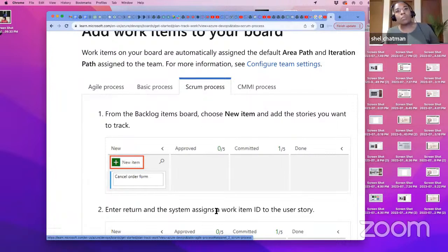So Scrum, the most popular Scrum process is 2 weeks. So every 2 weeks, you should be rolling out something new or completing a task. So I was just saying all that to say that when you guys work together, the idea is that all of these have to go from here to done within 2 weeks. So you've got a 2 week period to go from new to done when you pick up a task.